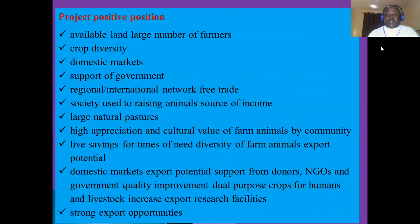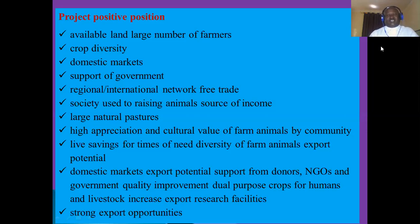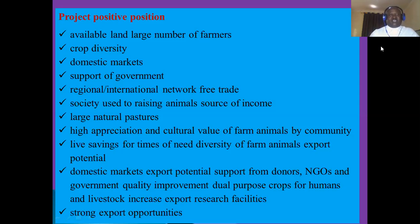In our content last time we looked at the SWOT analysis, but here we are not seeing it. I told you before — the theoretical background will help you to write any proposal. According to the guidelines of this proposal, we are told to look for the project's positive position, and here we have listed them. Whereas in a SWOT analysis we look at positive and negative factors both internally and externally, here looking at the project positive position covers strengths and opportunities. They are listed: available lands, a large number of farmers, crop diversity, domestic markets, and so on.